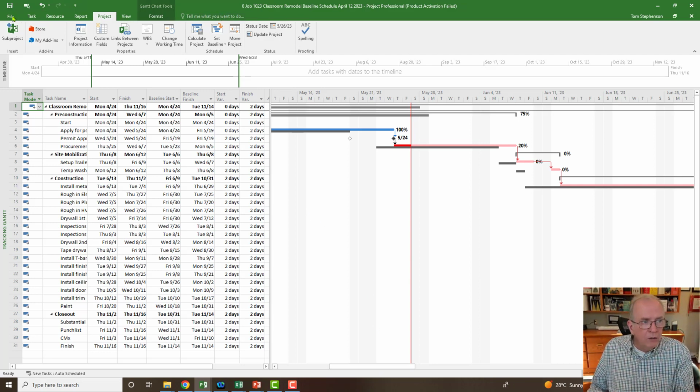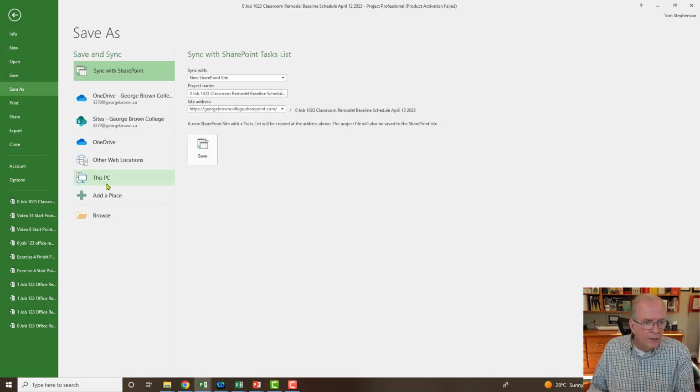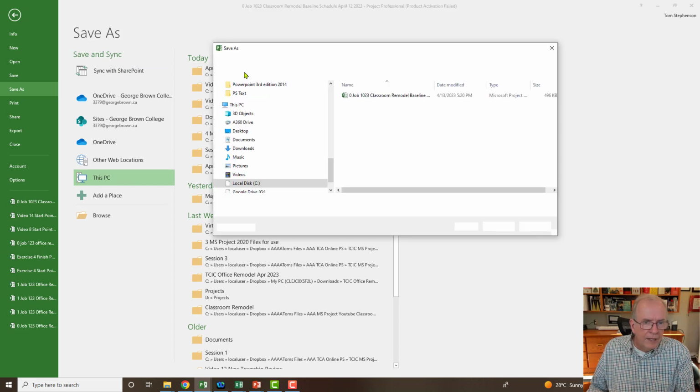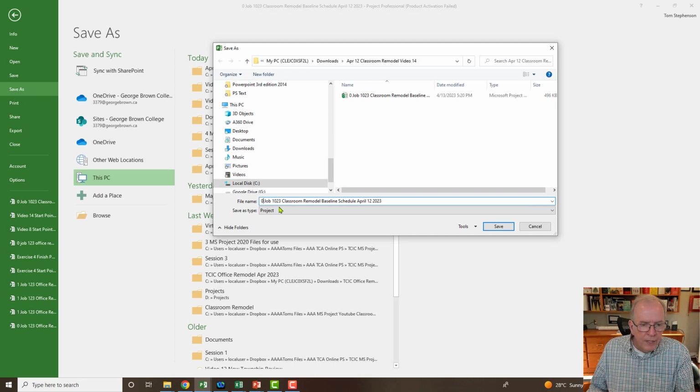Now I'm going to rename this file. I'm going to go File, Save As. I'm going to put it in the same folder that I created for this. I'm going to call this 1, because it's the first update. And I'm going to say this was for April 24th, when I made the status date. So you put the status date in, and I'm going to call this not baseline, but update. So it's the first update of job 1023 classroom remodel.